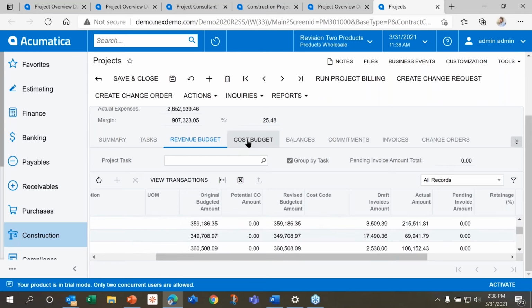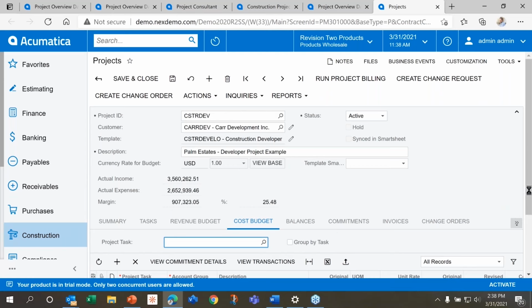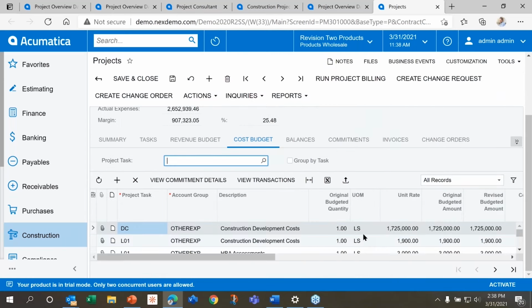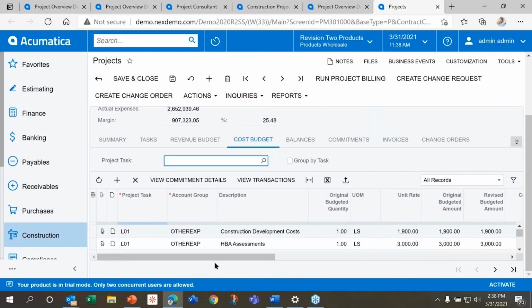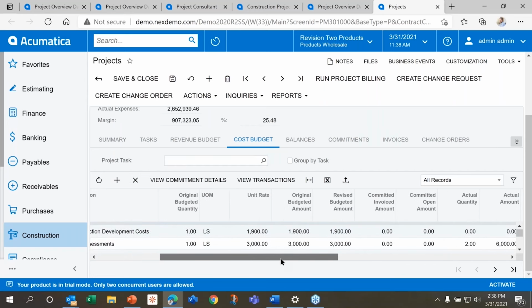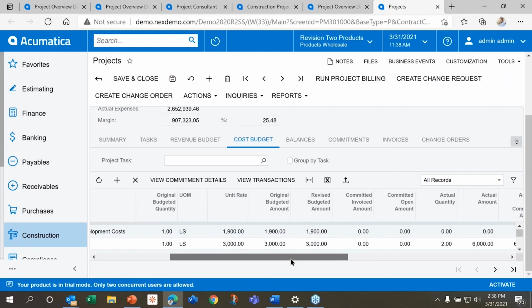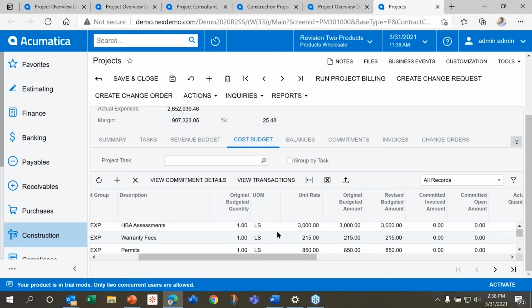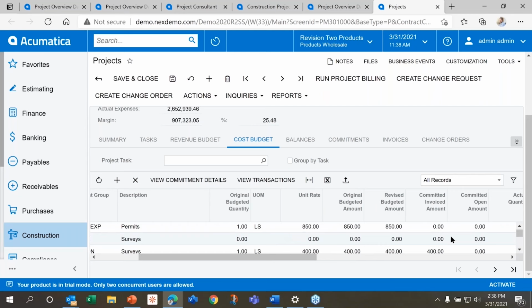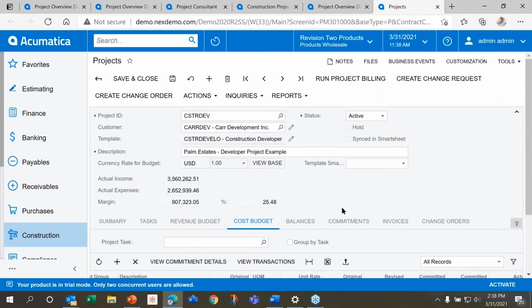As I go to my cost and budget tab, I also have the ability, this loads here, to see all the cost and budget items as I go across. I can even update these tabs. So instead of having to go into a record, as I'm working through my tool, I can come in and make any changes I want to. So I can update my percentage complete if I'm billing on a percentage. I can see that any time and materials time has been entered through a timesheet, and I can just click in any of these fields and update the price if I want to, and it will update automatically all the information at the top of the record.